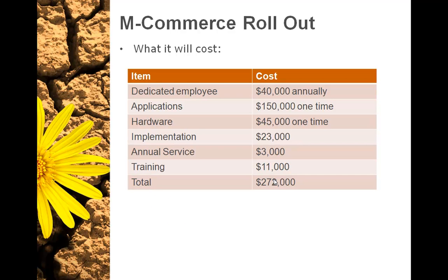What it will cost us on the dedicated employee, as you see here, $40,000 annually. The applications $150,000, hardware $45,000, implementation $23,000, annual service $3,000, training $11,000, for a total of $272,000.